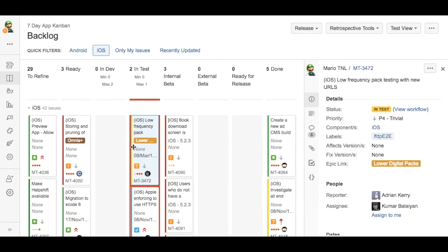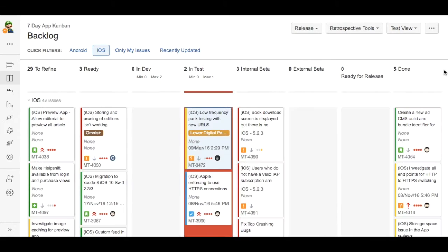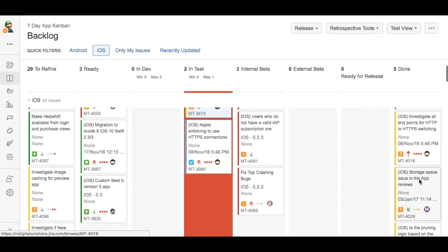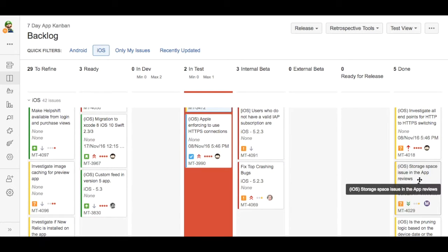Anyway, let's say that was still part of 524 and you put it into done. Then when you go up to release, you'll have iOS 524 in that list as well. If you just go and do release, it will just remove the tickets that are part of 524 from that done column. Now, you've probably noticed the glaring error, or thing that can occur, is that you have tickets here that aren't actually part of a release, they're just work you have to do.